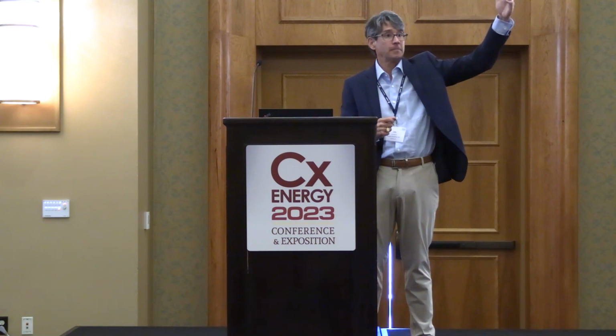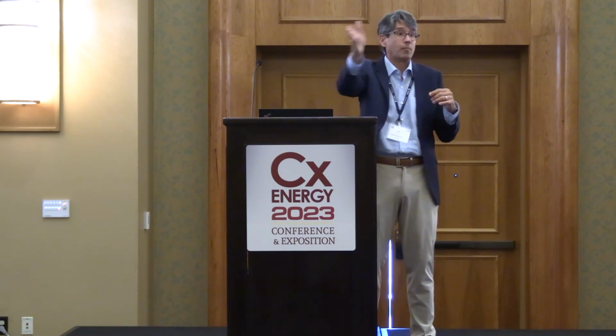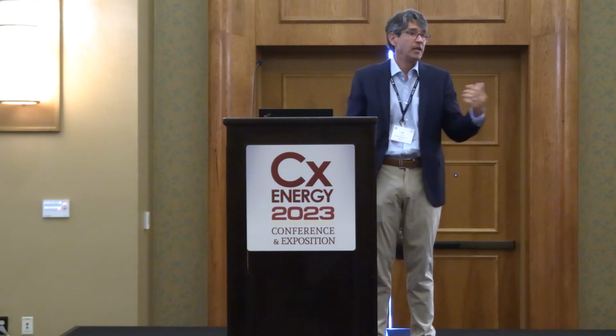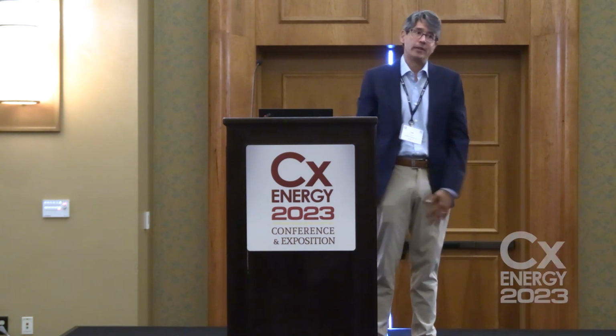So once again, if we're brought in early on the project and we can try to identify these things and go through it. Yesterday there was a seminar on scheduling basically. And it's really, if you could get your people to schedule backwards, when's the owner moving in? Okay, I need this much time for balancing the controls guy. Now what do I need next for those guys? I need electrical, I need startup, I need this complete. And work backwards on the schedule to get to your start date. That helps a ton of saying, what do I need? Here's what I need. And then when you get into phased ones, it really gets difficult and that kind of thing. But yeah, we run into that weekly.